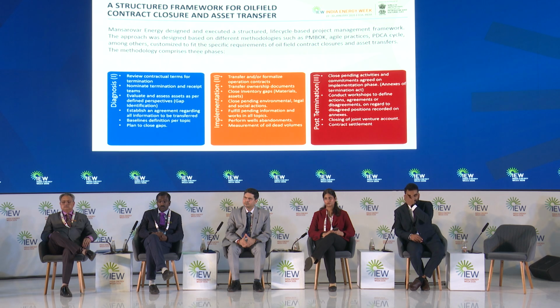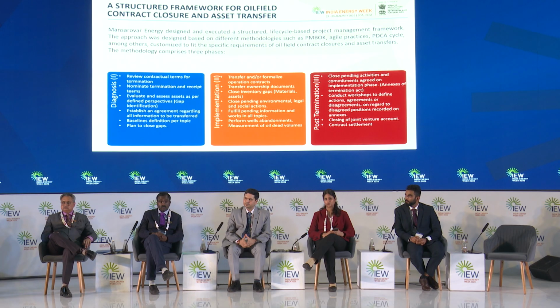And the last one, the post-termination phase, is to continue the closure of all the activities that we must do. Implementation is till the end of the contract, and post-termination is as soon as we deliver the assets, the activities that are remaining to close the contract.